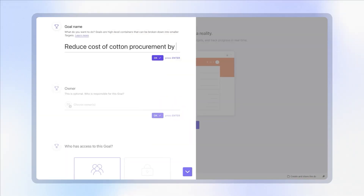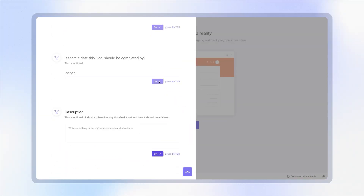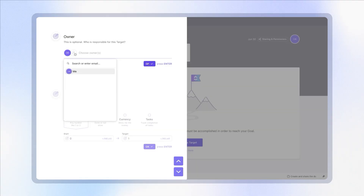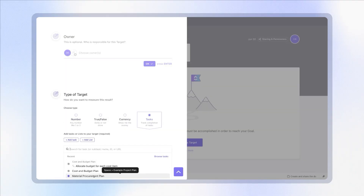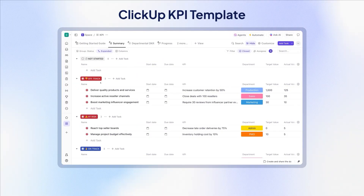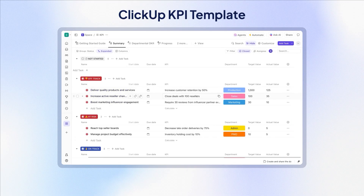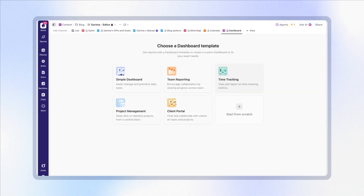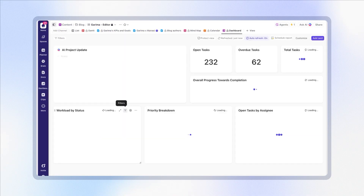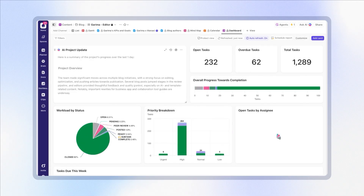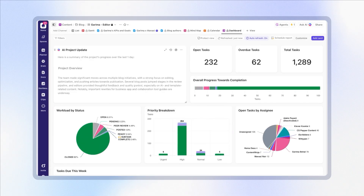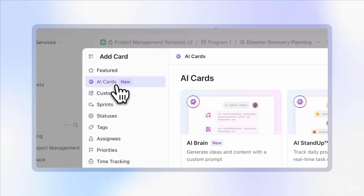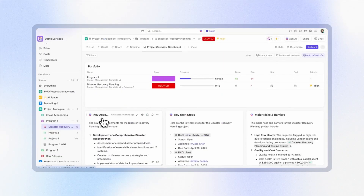Once your goals and milestones are set, the next step is deciding how you'll measure success. Add measurable targets to each goal and task, such as lead volume, retention rate, or delivery deadlines. With ClickUp's KPI template, you can do this really easily with just a couple clicks. Then use custom fields on tasks to track those numbers directly, or build dashboards that summarize your most important indicators in real time. You can also monitor key metrics by team, time period, or task type — and the cherry on top, AI cards that summarize the trends and analysis for you without wasting hours going through everything.